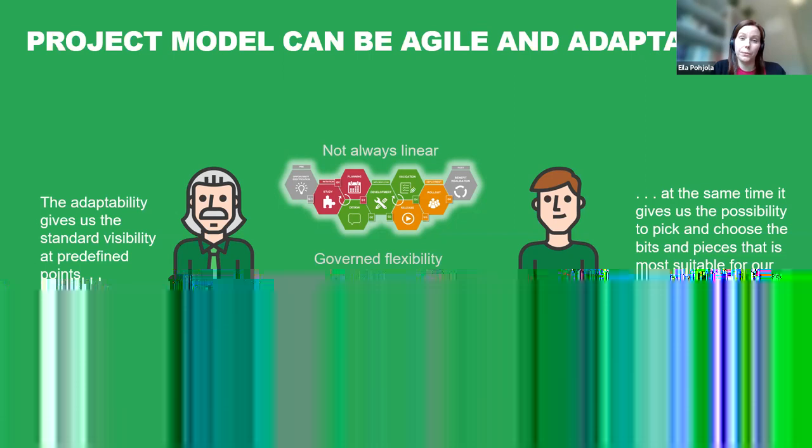And then my last slide is about the lessons learned. So we have now been on this journey for 11 months. And I asked the project manager and also the project team what they think about trying these agile elements. And they liked the fail fast, that we try something in a 4-week release, and then if it's not exactly what the user wanted, we have the next 4 weeks where we can again try to do something better.